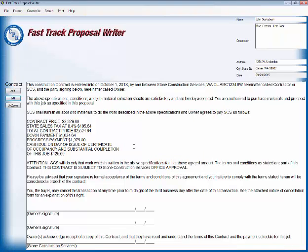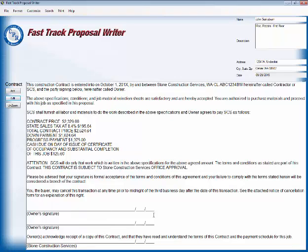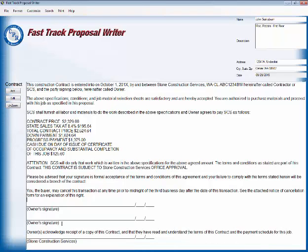This whole paragraph has now been edited. And you can see everything here. Again, now all your numbers for your job are right above the customer's signature line, and they can't complain that they didn't know or understand what the payment schedule was or the total amount for the contract. That is super important, and it's amazing to me the number of attorneys that don't understand that concept when it comes to writing contracts.